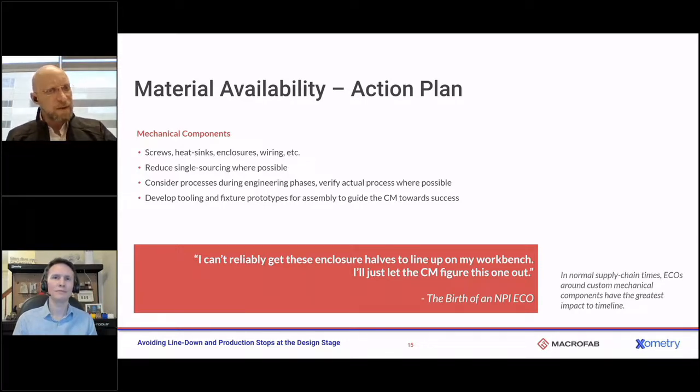And I want to speak a little bit to single sourcing. We tend to think buying the same part from two different warehouses or two different distributors is giving us supply chain diversity. Well, the reality is today we learn you can go all the way upstream. That manufacturer that manufactures that component and ships it to those two distributors can run low on the materials or have a staff outage and have a problem. You're not really single or dual sourcing if you're just buying the same manufacturer part from different people. You really want to look at your supply chain and say, hey, can I get different manufacturers, not just different sellers for this material?